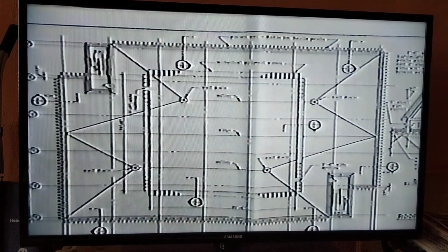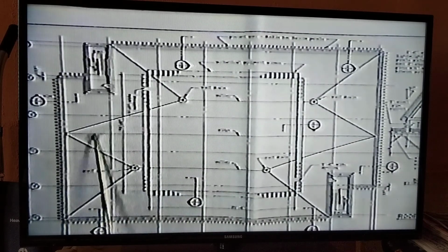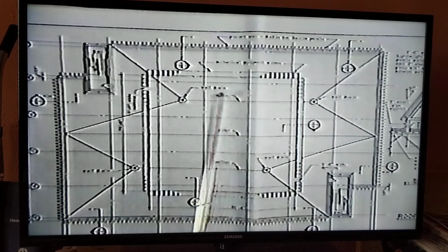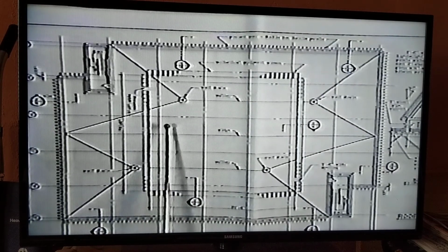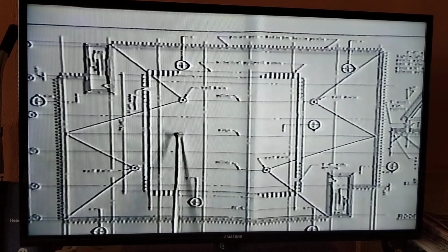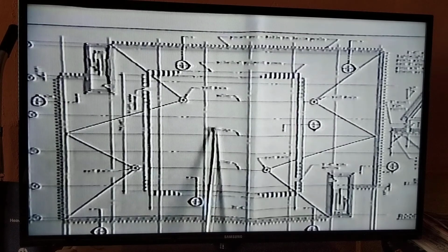The detail of the roof itself shows us a little bit more about how the building is configured. Generally speaking, however, for residential, general, and building contractors, there's not a lot of other questions that will come off of this particular sheet. However, roofing contractors might need to calculate the area of this shape so that when they take into account the selvage or the area of lapping, they'll be able to come up with an accurate amount of material needed to roll roof, for example, this roof.